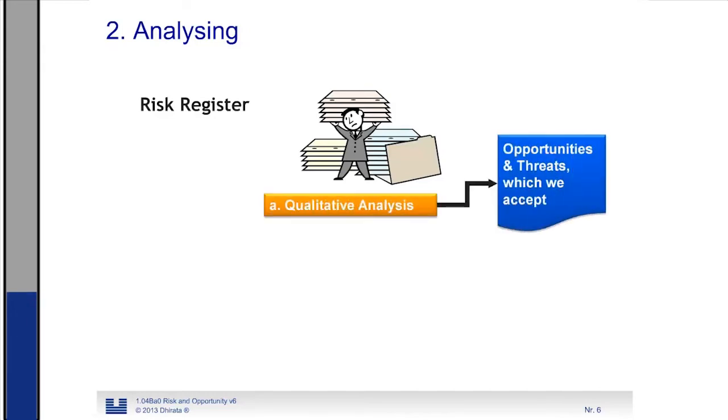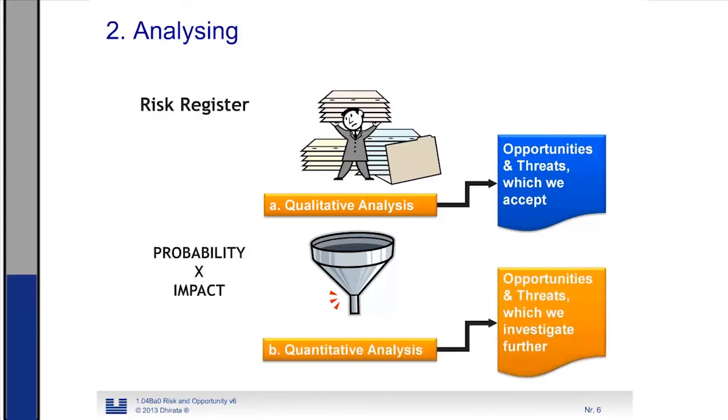Now, the first thing we are going to do is to do a qualitative analysis. So this is a quick analysis in which we are going to look which opportunity and threats, which risk are we going to accept. So what I mean with that is what risks and opportunity we are going to leave and we are not going to pay any extra attention to that. We look at high probability, we look at high impact, and these two criteria form like a function like a funnel. And from this huge list of risk we have a more dense list with risk that really need to be analyzed more thoroughly. And this more thorough analysis is the quantitative analysis. You see the difference, qualitative is in high, medium, low terminology and quantitative analysis is really with real figures, with real probability percentage. And these are the opportunities and threats that we are going to investigate further.